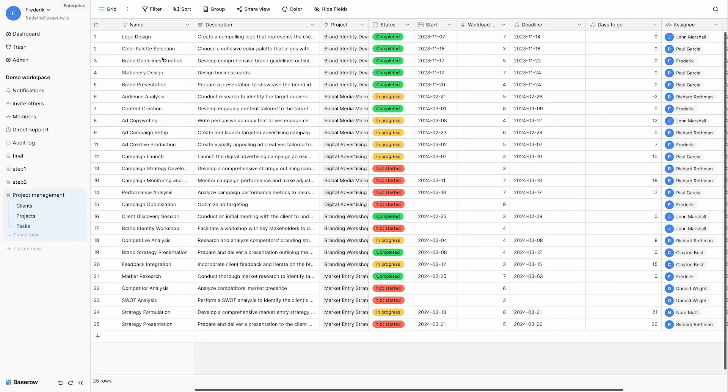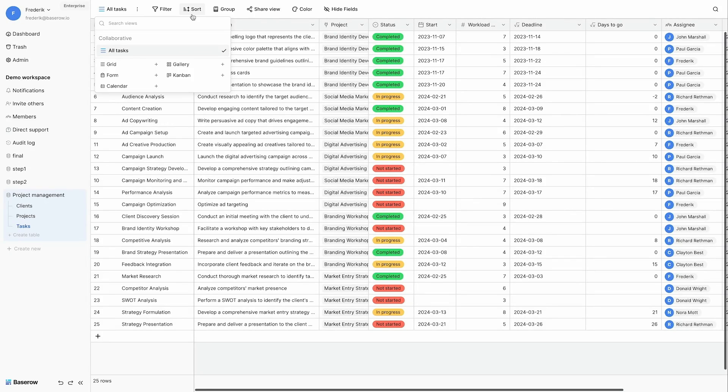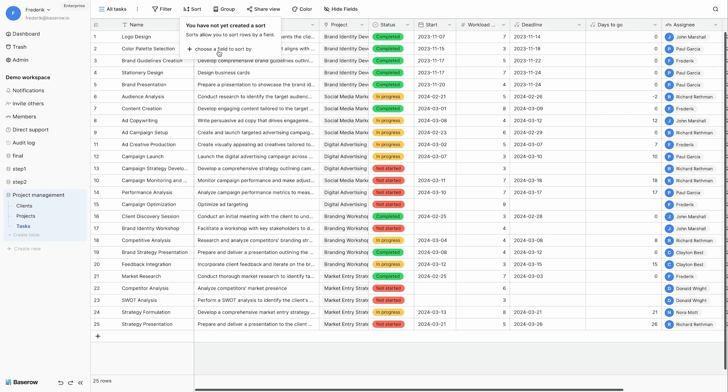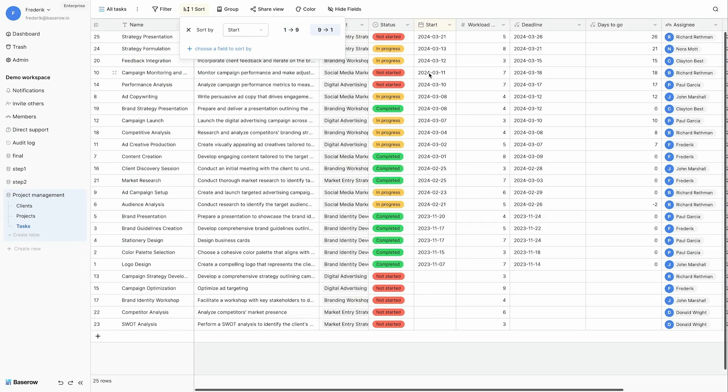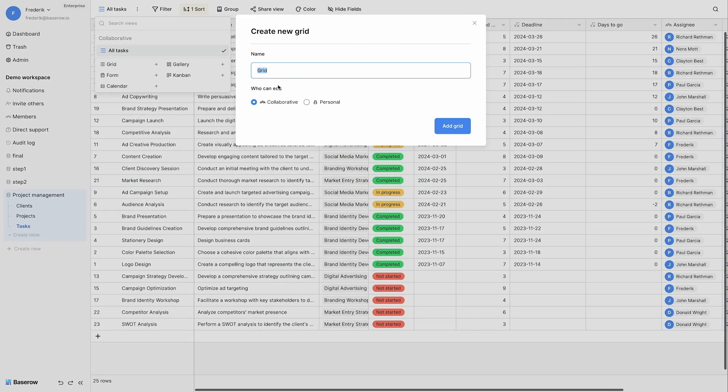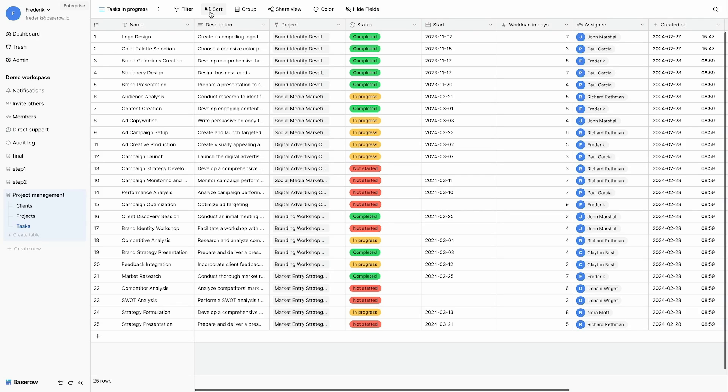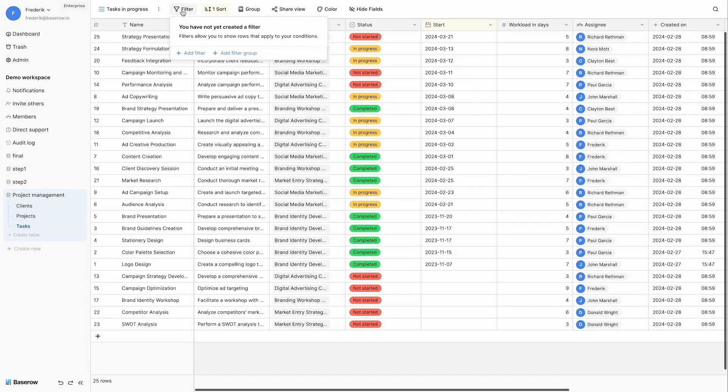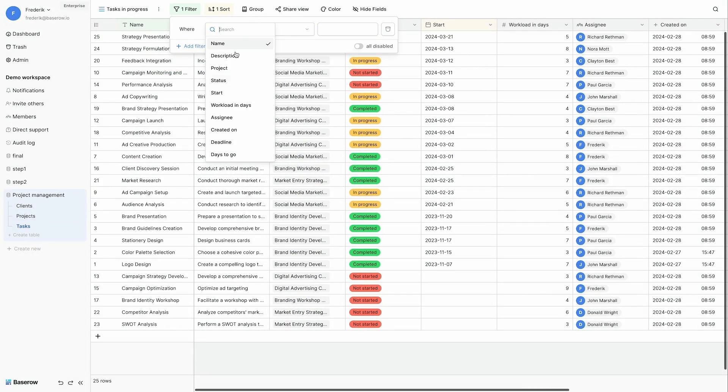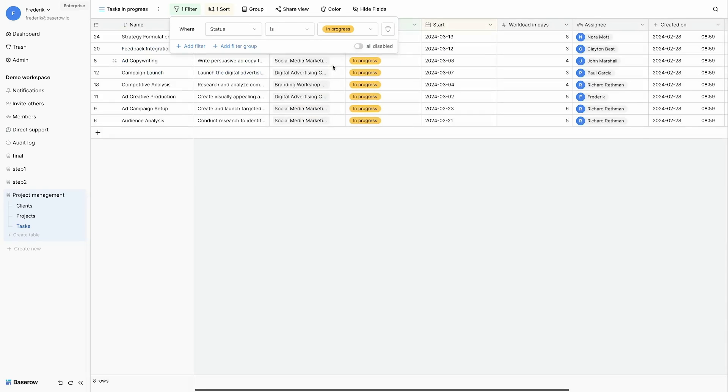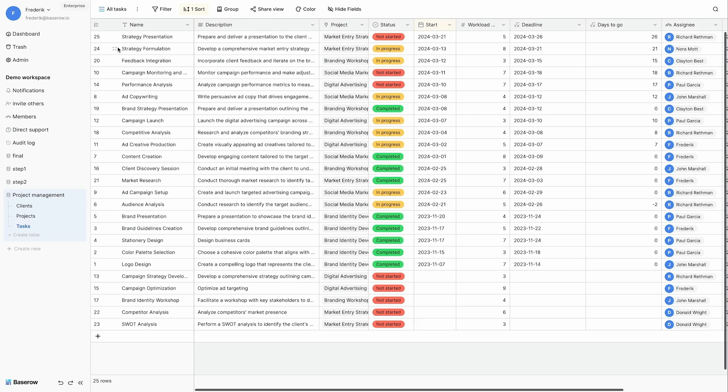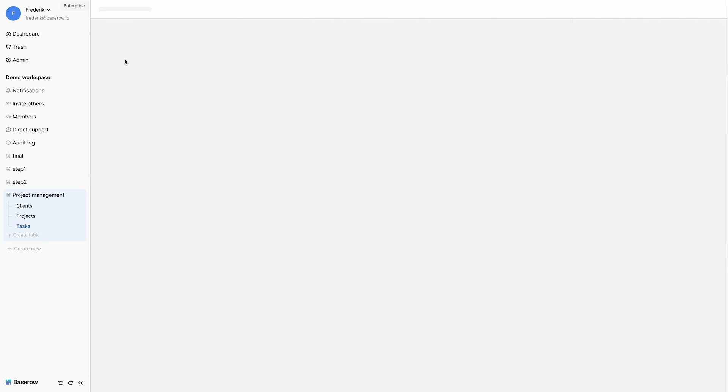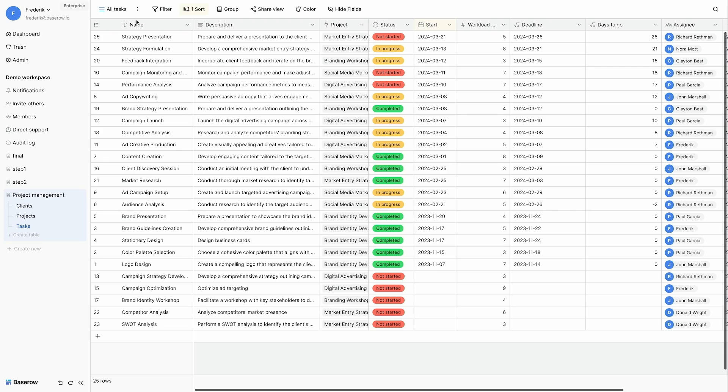Each table has by default a single grid view. Let's rename this to all tasks. And let's sort our default view based on the start date. And I will put the most recent start date on top. I'm going to create a new grid view for the tasks that are in progress. So this view will only contain tasks in progress. I sort them again based on the start date. And I add a filter to them. And this filter will only show records where the status is in progress. The other records have not disappeared. They are still in my all tasks view. But I have a view specific for tasks that are in progress.